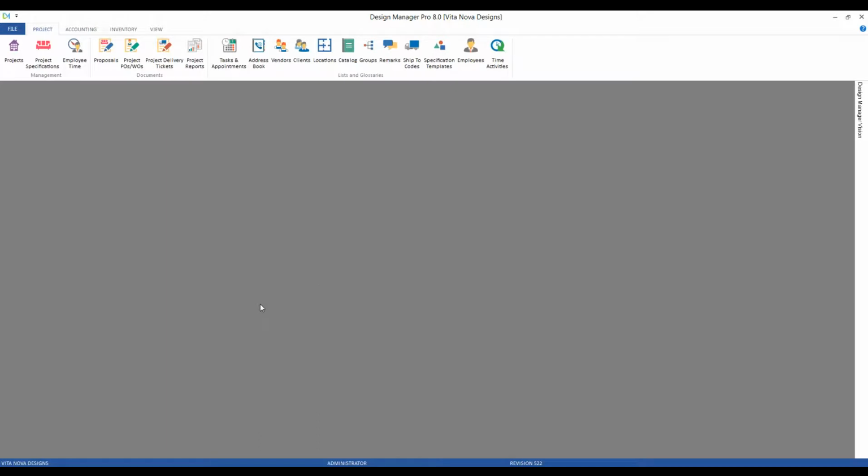Design Manager Professional really has two mechanisms for monitoring budgets. One at the project level, which has a robust system to record budgets along with an elaborate system to ensure the budgets are maintained, and at the item level, which is convenient for smaller projects or where the client wants to approve expenditures for individual goods and services, such as not to spend more than $7,000 on the couch or $15,000 on the bar and bar stools. And the item level can even allow you to generate an optional budget document that you can provide to your client. Let's begin with project level budgets first.